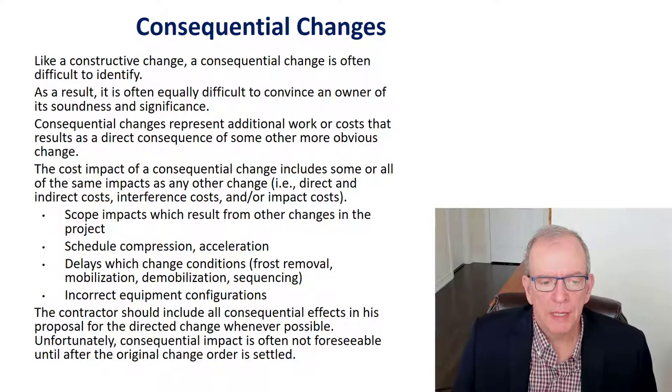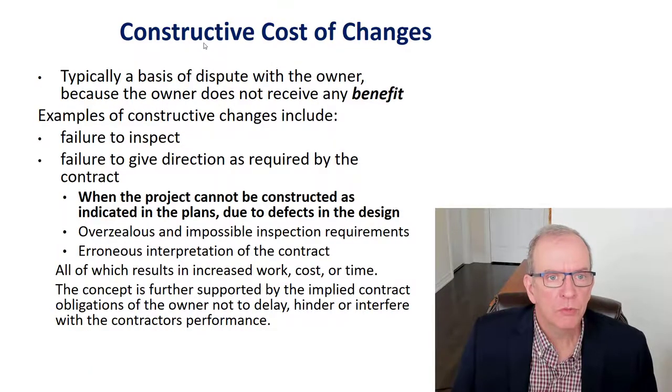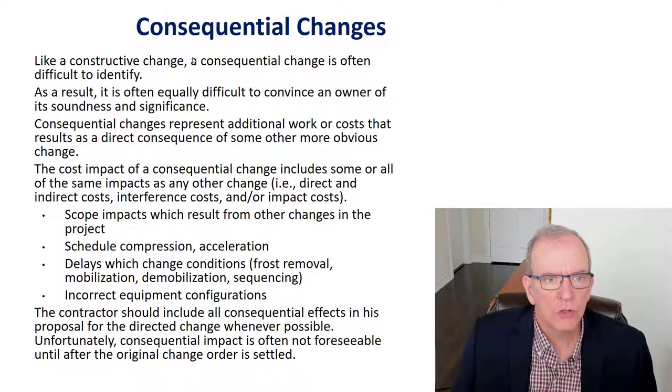Otherwise, it ends up being a claim, and unresolved claims very often end up in litigation, which is generally negative for everybody, including the relationships that are involved in the project. So that is part of the aspect. So consequential changes. So this was constructive cost of changes.